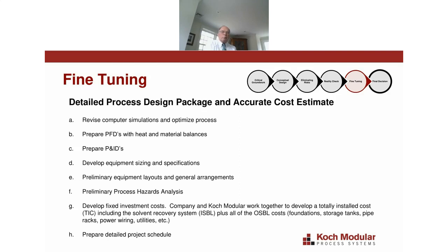And then we would typically participate in a PHA, a process hazards analysis with the client, make any adjustments to the process design package, and then from there, we have enough information to develop a fixed firm price to do the detailed design and construction of the solvent recovery system with full performance guarantees at this point. And of course, we would also give the client a detailed project schedule to complete that work.